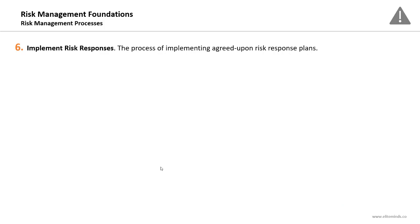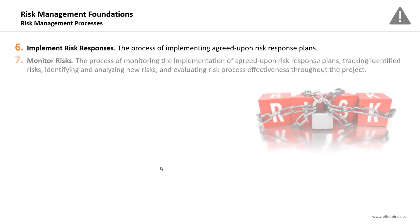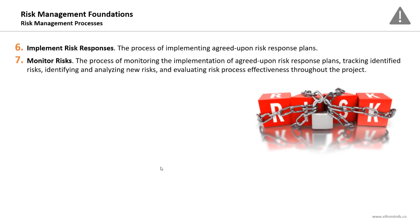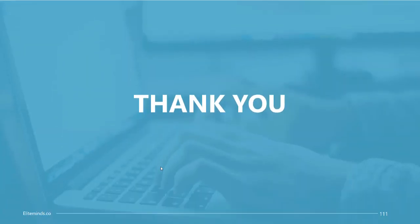Process number six is Implement Risk Responses — the process of implementing the agreed-upon risk response plans, and it's part of the executing process group. Process number seven is Monitor Risks — the process of monitoring the implementation of agreed-upon response plans, tracking identified risks, identifying and analyzing new risks, and evaluating risk process effectiveness throughout the project. In summary: five processes in planning, one in executing, and one in monitoring and controlling. This is all for the risk management foundations section.